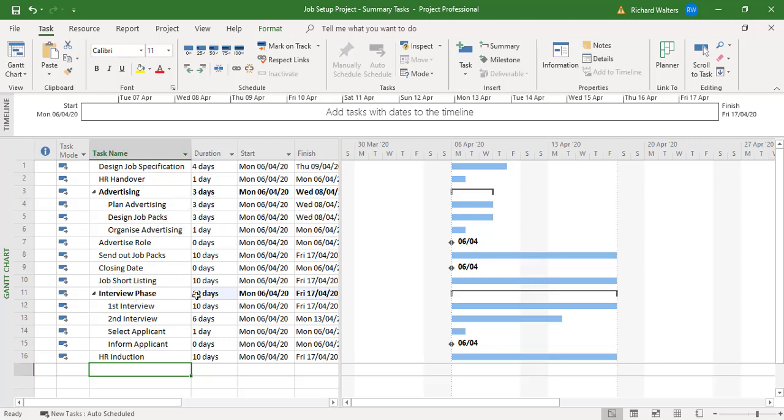Interview phase won't show ten days when they're linked. It'll show ten for first interview, six for second, so 16 days and one more for select applicant.